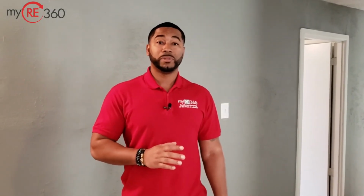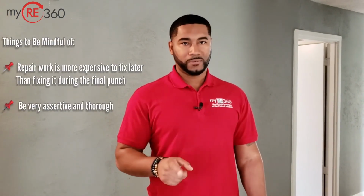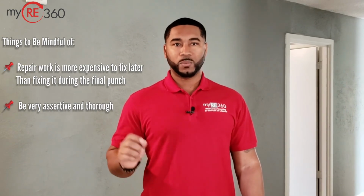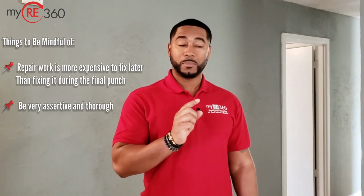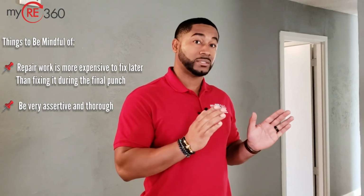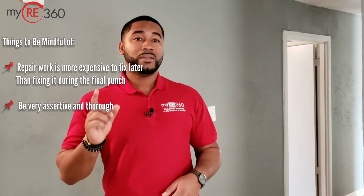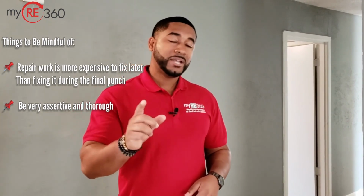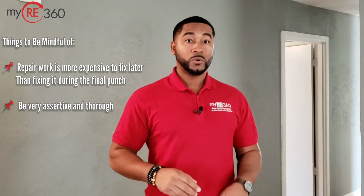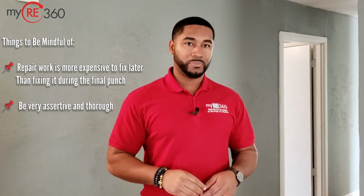Now that you've completed your walk of the house, it is very important to be mindful of a few things. One, it is much more expensive to bring someone out to fix a repair when the job has been done versus getting them fixed during your final punch. So you always want to be very assertive and make sure to thoroughly evaluate everything. This way, when you deliver your house to your buyer or renter, you won't have to bring someone back out and pay a premium.